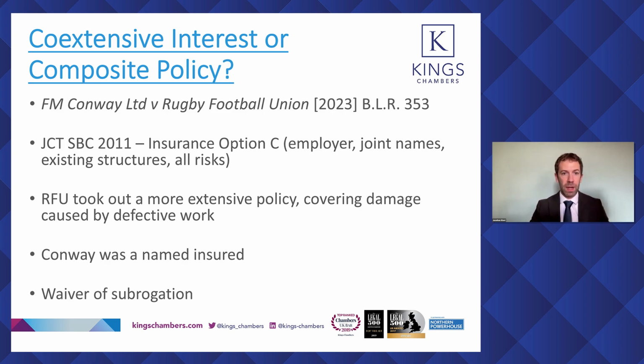RFU engaged Conway to carry out some works to Twickenham Stadium. Obviously, that was an existing structure. RFU's obligation, so RFU as the employer, had an obligation under the JCT contract to procure joint names insurance under option C, in particular, all risks insurance in respect of existing structures.